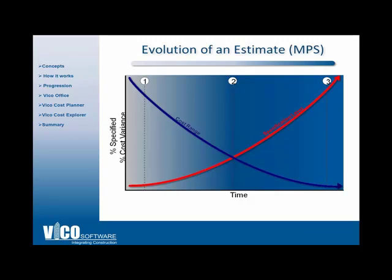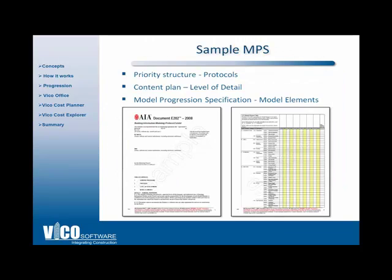The goal of VICO Office, VICO Cost Explorer, and VICO Cost Planner is to help you facilitate this process and implement model progression through what we call the Model Progression Specification. As mentioned earlier, this is the tool — the formula or spreadsheet — documented in the AIA E-202 document for defining the stages as you progress from a very schematic model to a more specific model during the course of construction. VICO initiated the development of the MPS document with WeBCore, and WeBCore refined the process through the AIA California Council. The document was released in December 2008 and describes the level of development and includes a sample model progression spec.